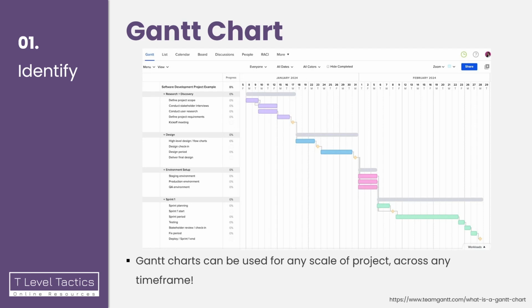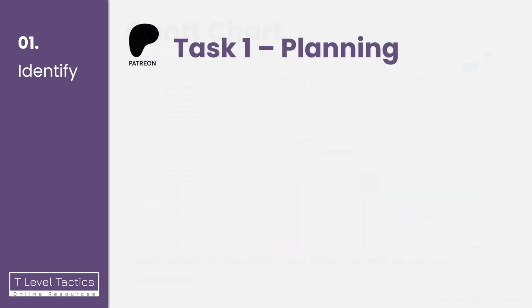Now you'll see that there are, in a couple of instances, cases where the duration of multiple tasks overlaps. For instance, in the middle, there are 3 pink rectangles that stack on top of one another. And this is to indicate where those tasks can all be completed at the same time, simultaneously, if you've got enough staff to do it. So that's a bit of a look at some project planning.